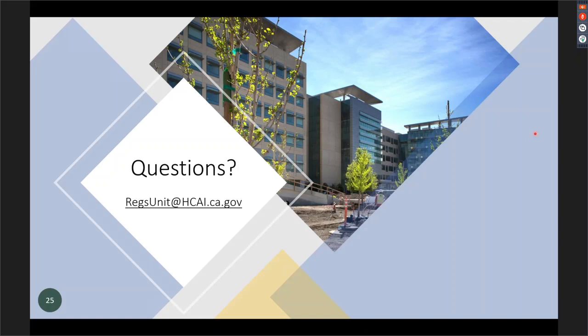If one NMA may trigger an ACD, but that's kind of why we're having you look at it to make sure it's not an MA, providing this guidance. Again, if you're not sure, please contact the compliance officer or the field staff to ask the question. If it happens once, no harm, no foul. We're going to proceed with it. If it becomes an ACD, you'll probably be asked to stop work on that particular item while the ACD is being reviewed.